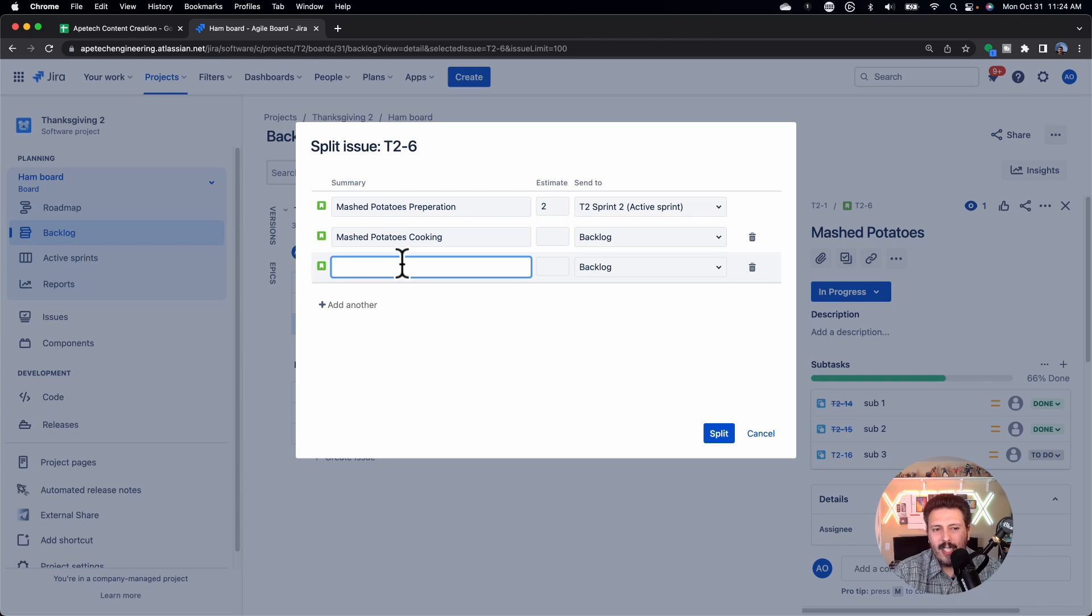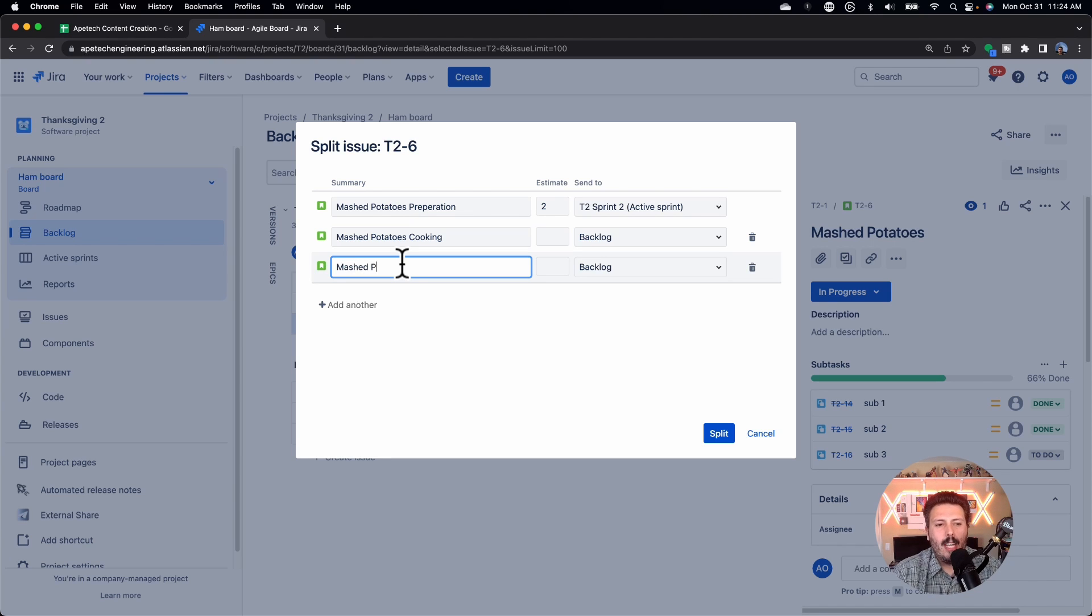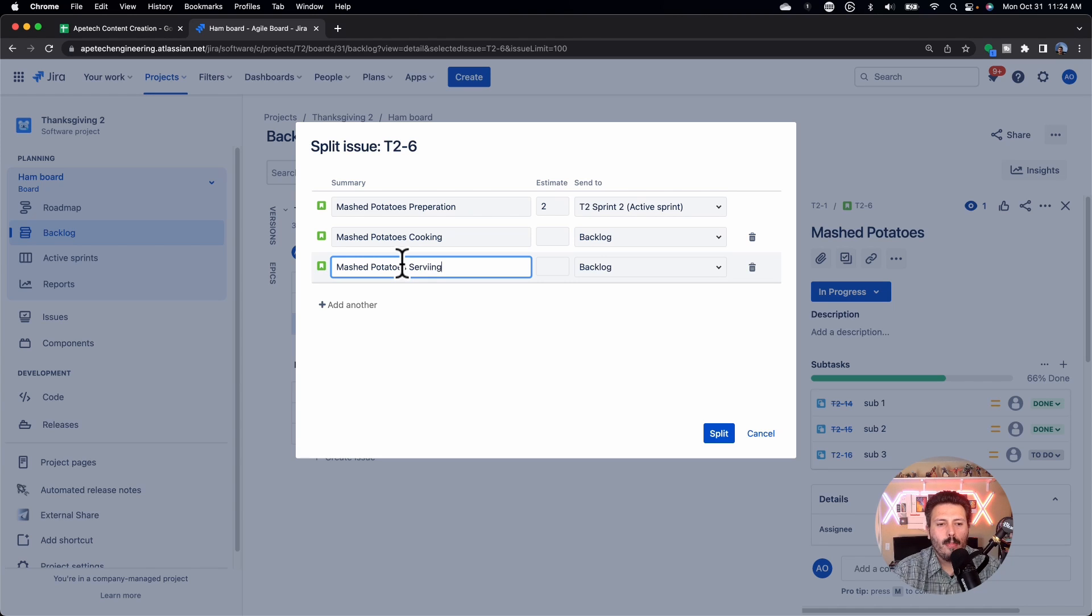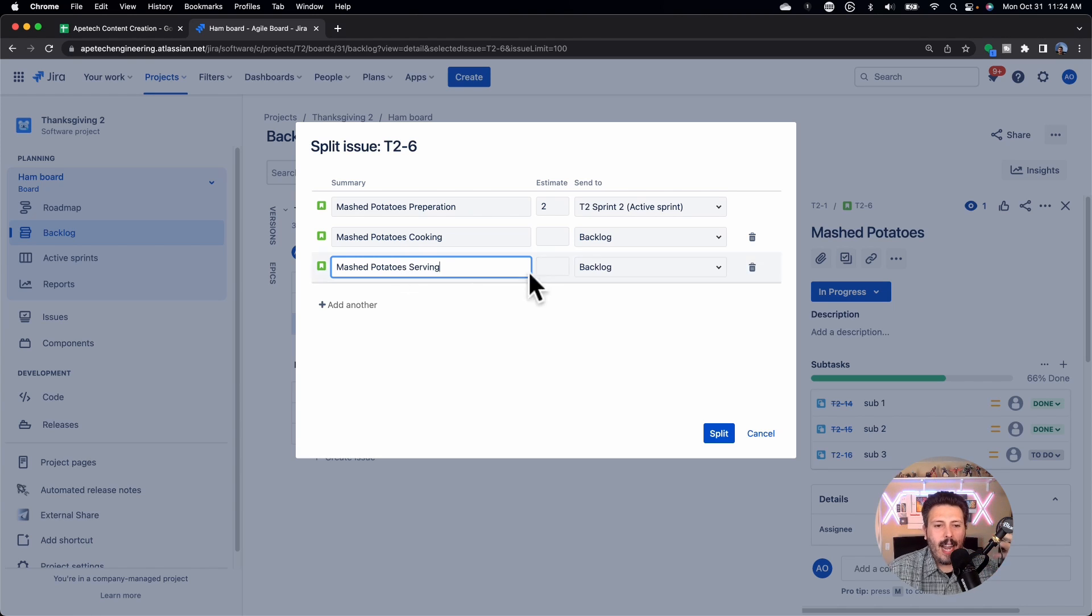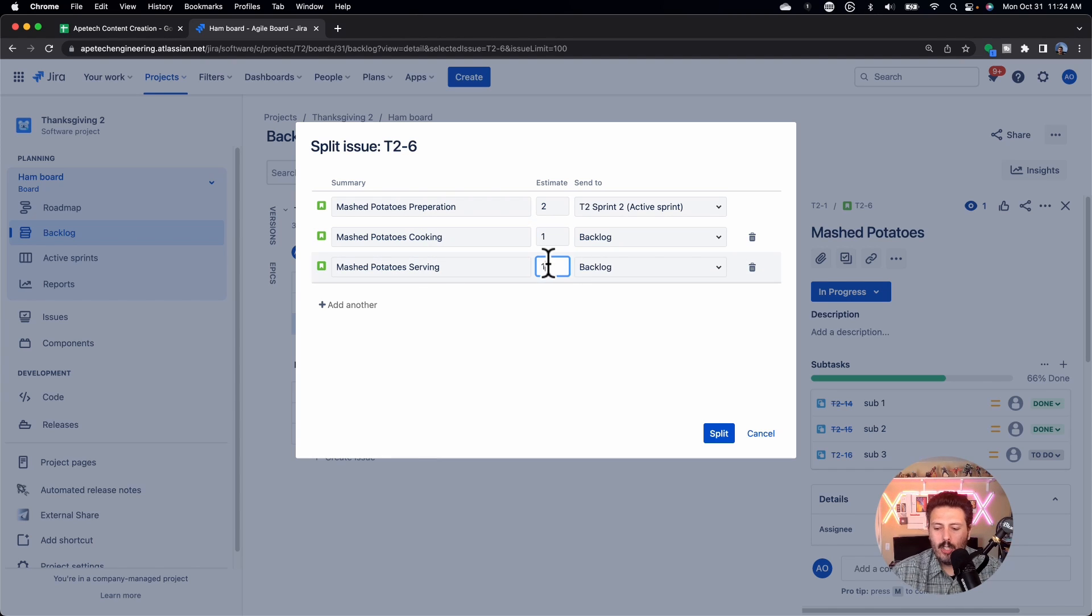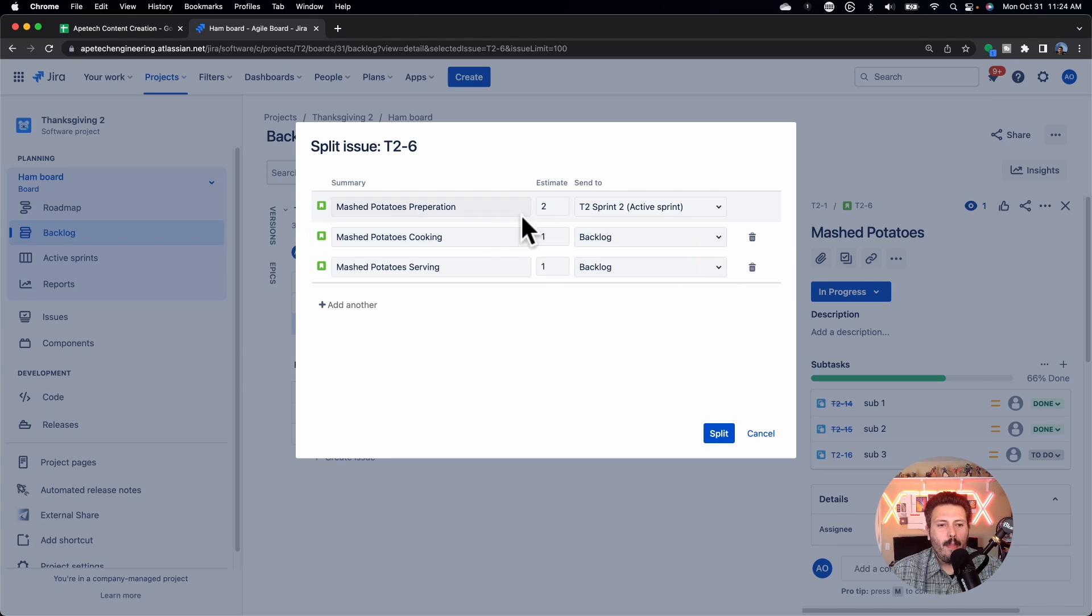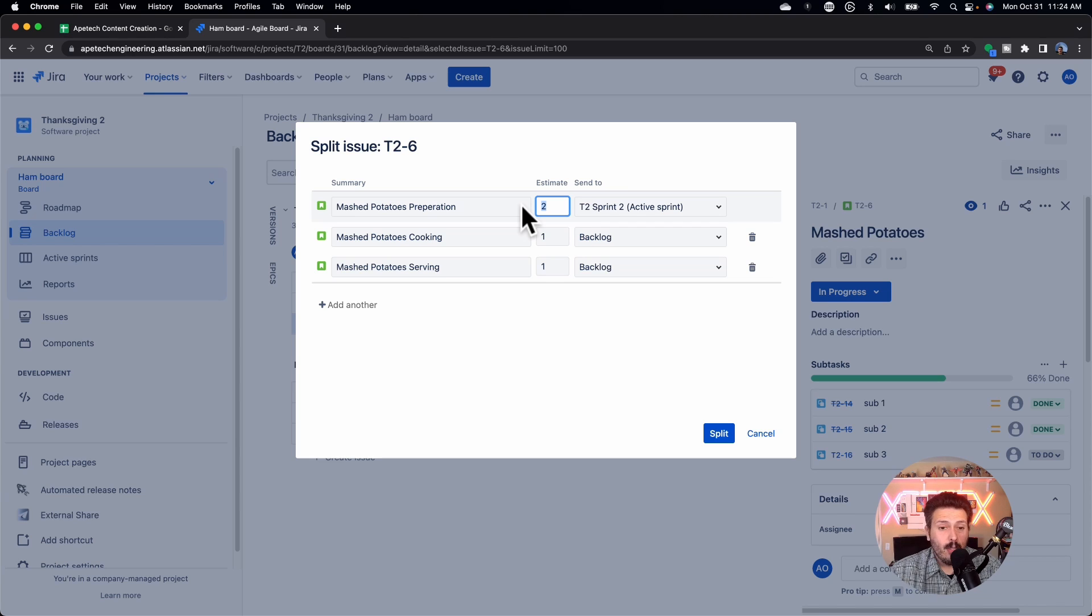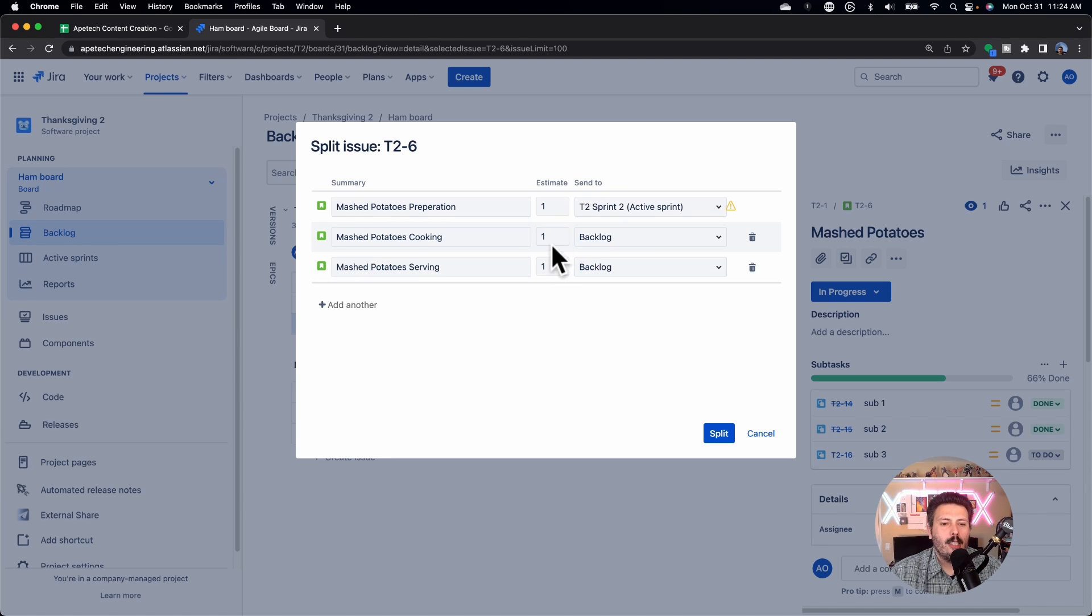Let's do mashed potatoes cooking, mashed potatoes serving, right? So if you want to just break this up a little bit more with a little bit more detail, you can actually just create as many stories as you want. You can re-estimate these. So these can be like one pointers each, and you can throw them away if you want to. But essentially, once you kind of figure out, and you can say, you know what, this one used to be a two, let's just take credit, it was a one, and then we're going to split these up into two extra ones.